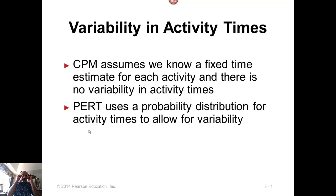For example, if we expect a particular activity to take, say, 5 weeks, but we are not certain that it will take 5 weeks, it could be smaller than 5 weeks or it could be more than 5 weeks. Is it equally likely with 5 at the center, like 1 week earlier or 1 week later with equal probability like in a normal distribution? Let's look at it in a different angle. Suppose if we are able to reduce from 5 weeks to a smaller amount, if we are able to finish the activity sooner than 5 weeks, so it could be 4 weeks or 3 weeks, and as you go down, it becomes harder and harder for the activity to be finished earlier. Theoretically speaking, even though it is not practical, the smallest you can get is 0. You can't go below that, so that's a hard floor for how much smaller the activity time can be.